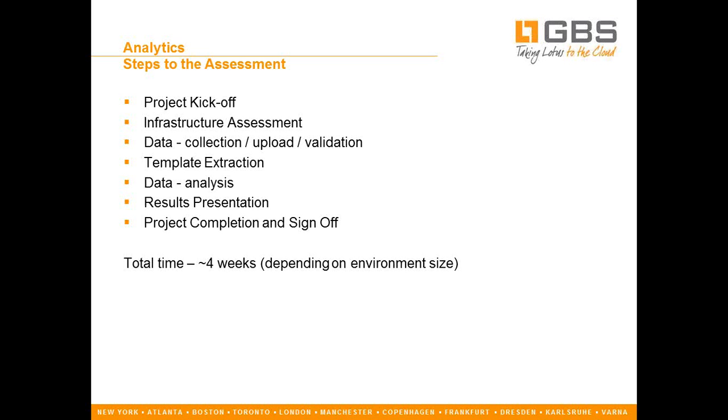So just to recap, the Transformer assessment, we start off with investigating your existing Domino infrastructure, getting a copy of those templates that you're looking to transform, analyzing those templates, developing a detailed report with specific cost estimates and a specific project plan, and presenting that project plan and results to you, at which point from there forward we can start with a sign-off on the work to be done and move forward to form a partnership for enabling your transformation goals.